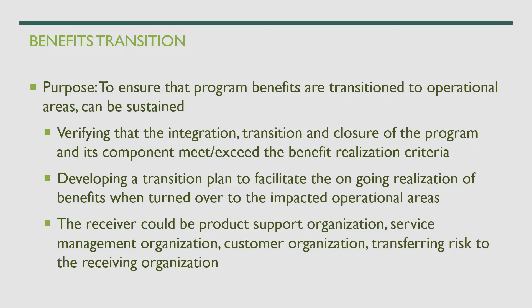It's very important to monitor and evaluate it. You need to verify that integration, transition, and closure of the program and its components meet or exceed the benefit realization criteria — criteria you may have set during the planning phase. As a program manager, you need to develop a transition plan to facilitate the ongoing realization of benefits and hand over to the operational area, so people know what is coming their way and how to handle it.